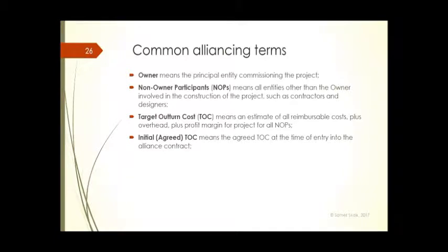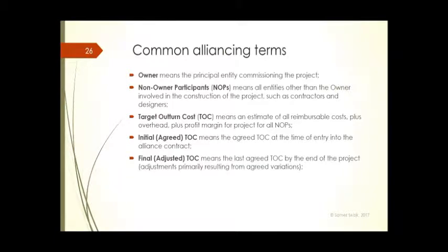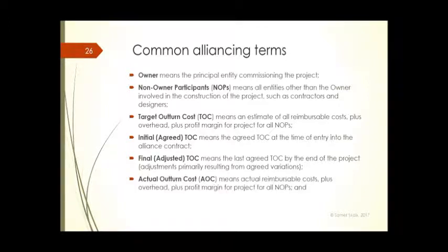So we have some other techniques. Okay, how can we assume then what is the cost? You need to assume how much your budget is. You need to know what the final budget is later on. Then a difference, if it is in your advantage, this means that you have to share the gain. If it is less, they have to share the pain. And the only pain that they share is their markup.